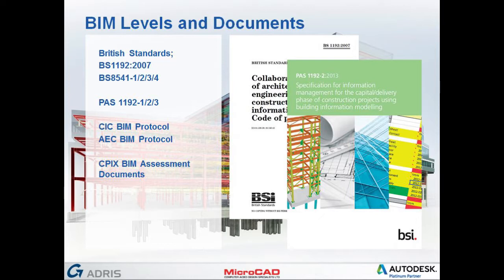The CPIC BIM assessment documents were produced originally in part with Skanska, and central government have now put them up on their task group websites. They're basically an aid to communication. The idea is that as you get involved in a new BIM project, you would use the assessment documents, and you may be asked to fill them out, or you may be sending them to somebody else to fill out.